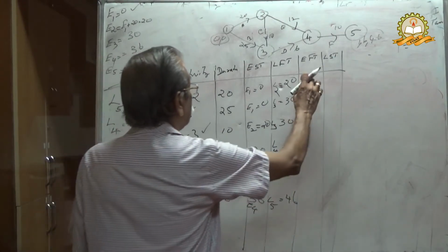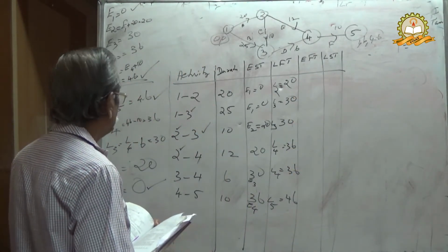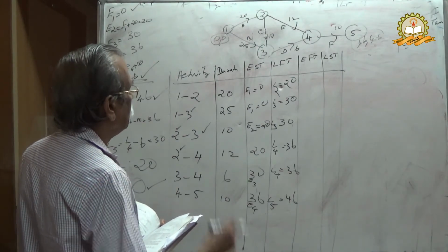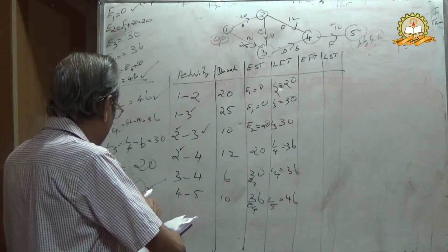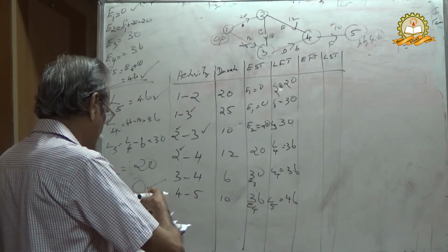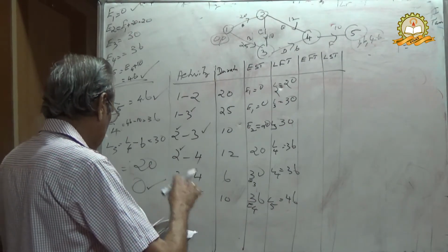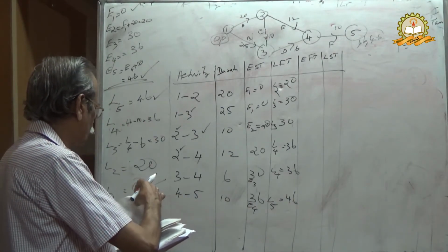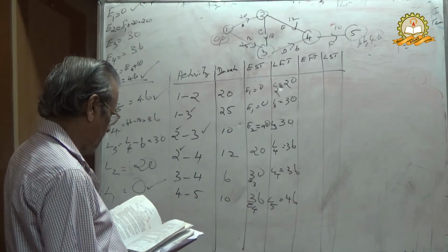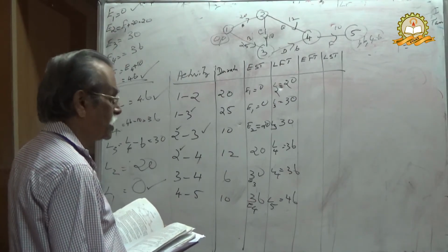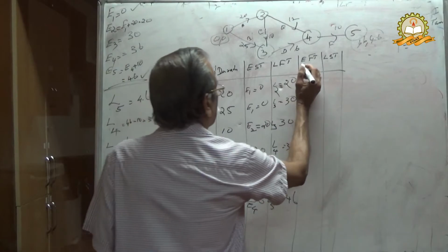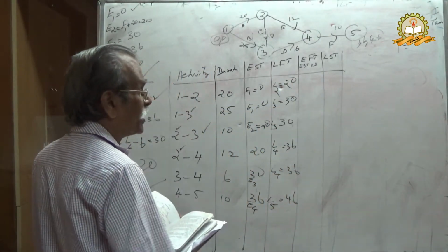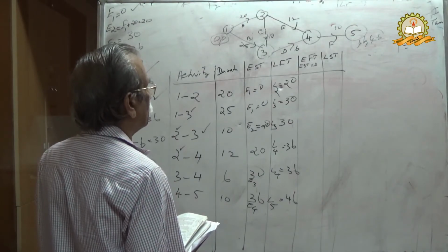Then EFT. EFT means early finish time. Early finish time means early start time plus duration, that is, the start time and the duration.